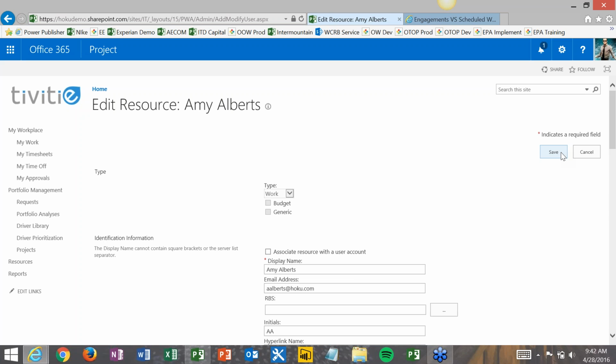Okay, when a resource manager commits to an engagement, the Gantt chart does not directly pick up the assignment. The project manager still needs to make the assignment. Is this correct? That is correct, yeah. So engagements and task assignments are two different things.